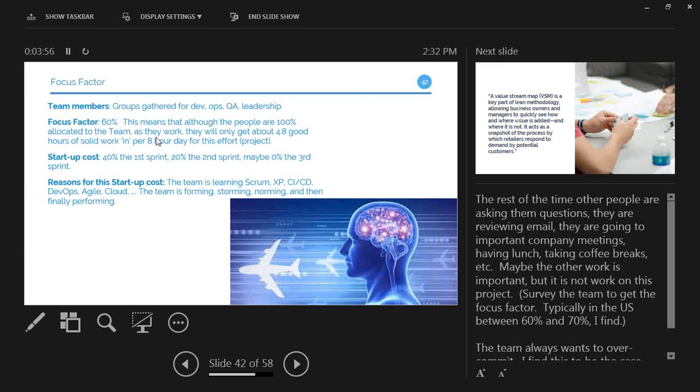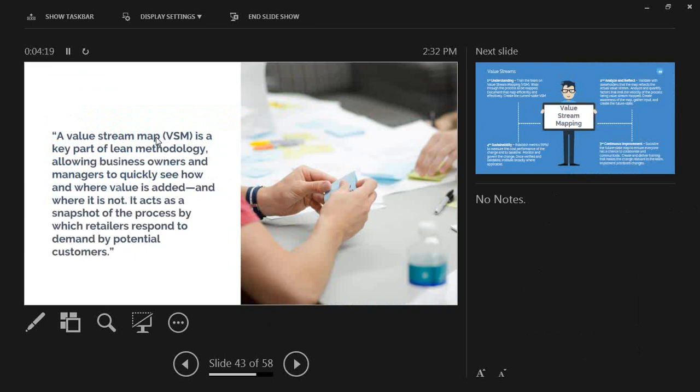Here we're looking at what we can put in as, for lack of a better word, a focus factor, a human factor, though some people would call this the fudge factor. It's giving someone a break because they're learning as they're doing it. Once they get good at it, of course, we reduce the factor until the factor is 0. This is basically our shim to keep our team's average productivity and velocity steady over time.